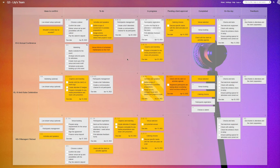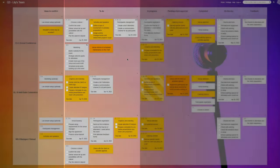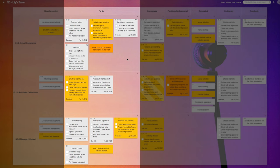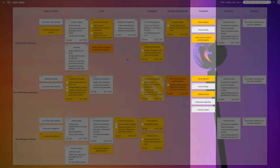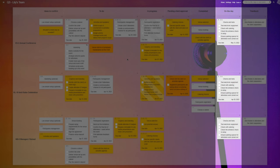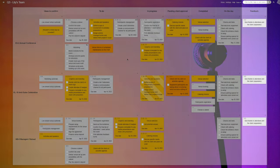On this Kanban board, they're currently working on three events. They've defined the process stages as follows: Ideas to Confirm, To Do, In Progress, Pending Client Approval, Completed, To Be Done on the Day, and Feedback.